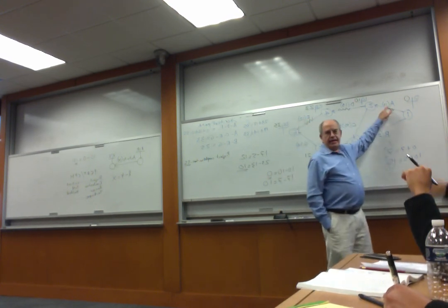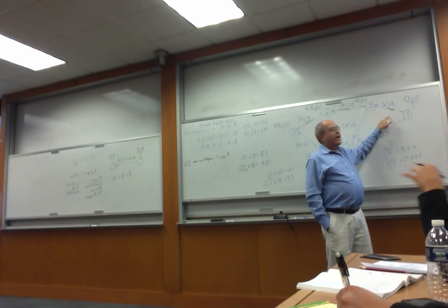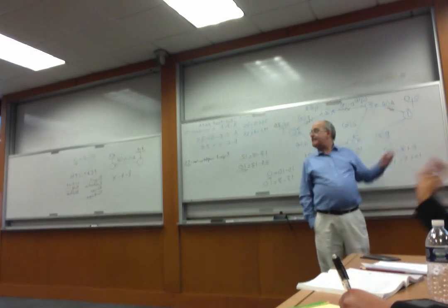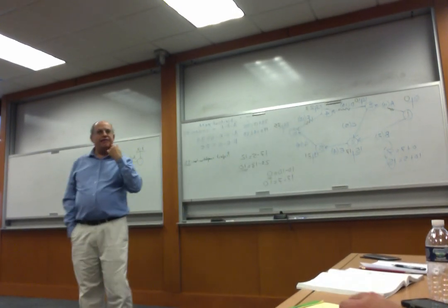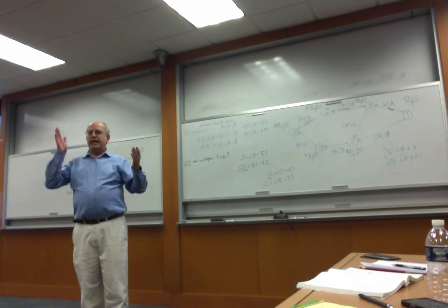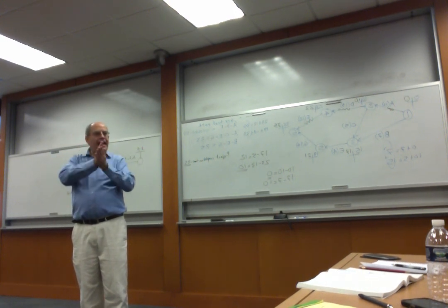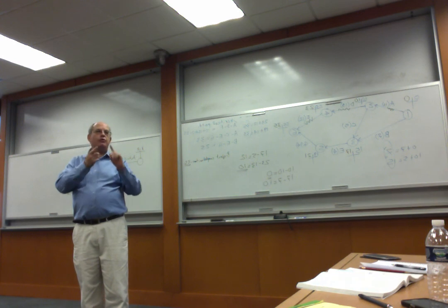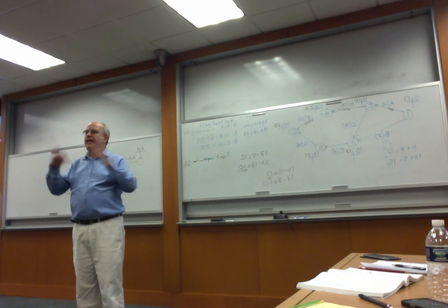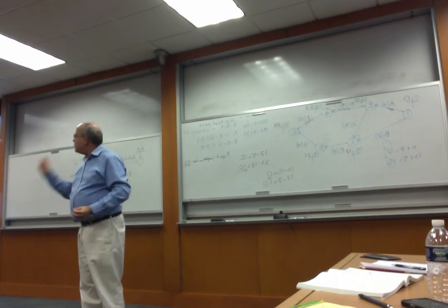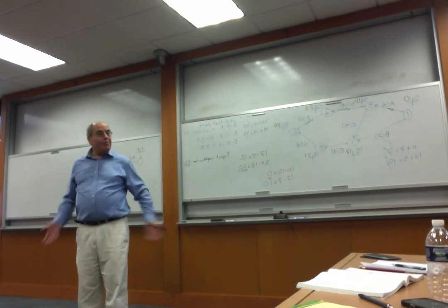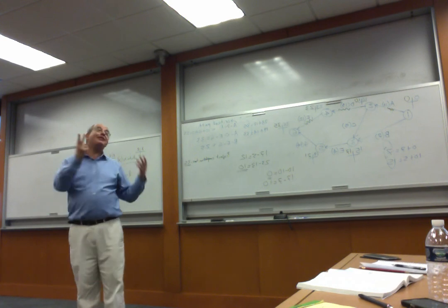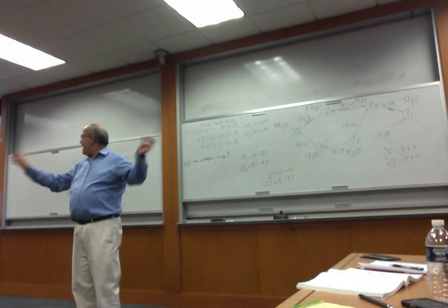How do you obtain the values that are used in this? I'm saying the activities, the values, the amount of time. How do you know the 10 units? Estimates. Right now I just put a number, but in real life, in the commercial software, you make a guess. Most likely, they ask you for 3 values: optimistic, pessimistic, most likely. They say, what do you think under normal operating conditions? We call it most likely. And then we say, if things go wrong, how long is it going to take? Pessimistic. If things go perfect, how long is it going to take? Optimistic. So they ask for 3 values: smallest, highest, and something in the middle.